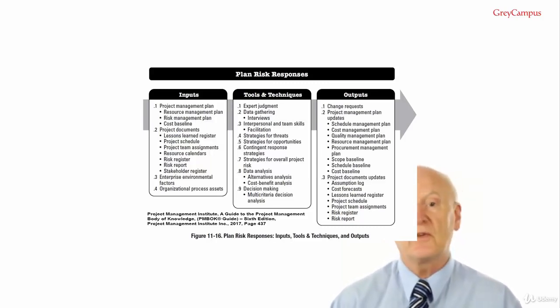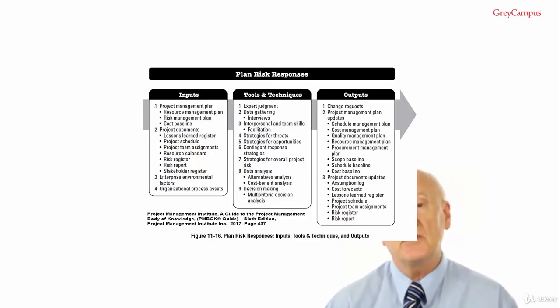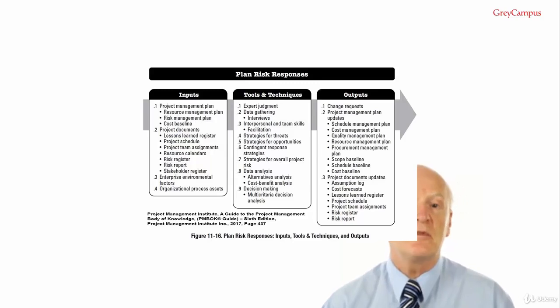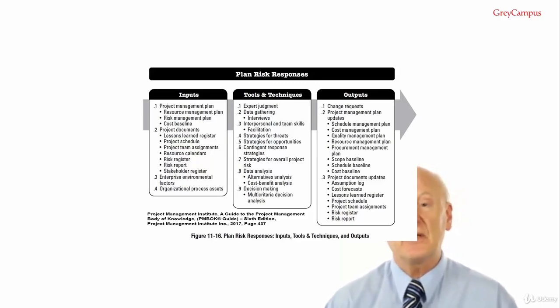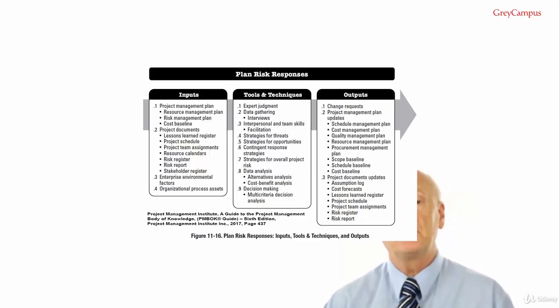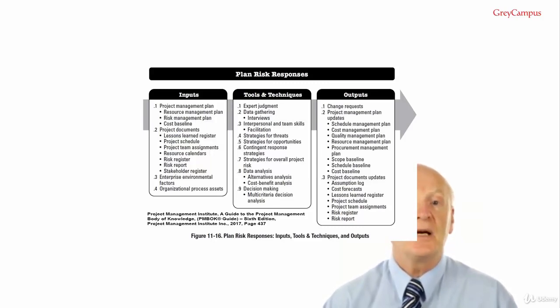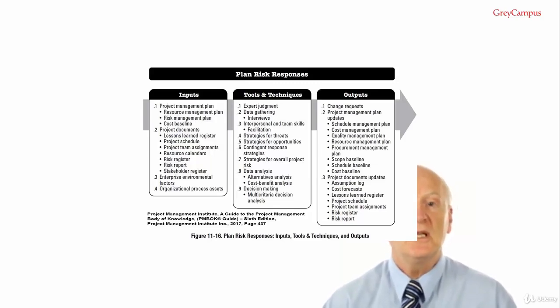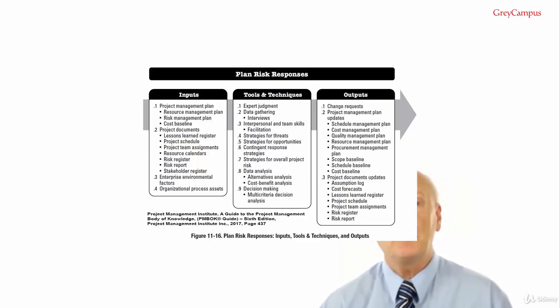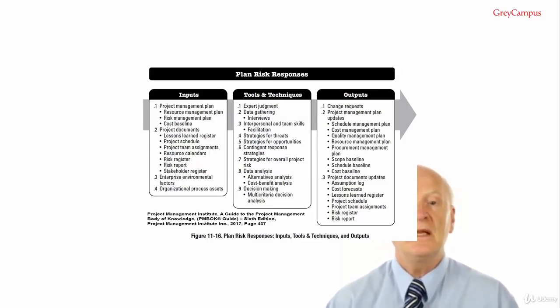Sharing involves transferring ownership of the opportunity to a third party so that it shares some of the benefits if the opportunity occurs. It's important to select the new owner of the shared opportunity carefully so that they're best able to capture the opportunity for the benefit of the project. Risk sharing often involves payment of a risk premium to the third party taking part in the opportunity. Examples of sharing actions include risk sharing partnerships, teams, special purpose companies or joint ventures.